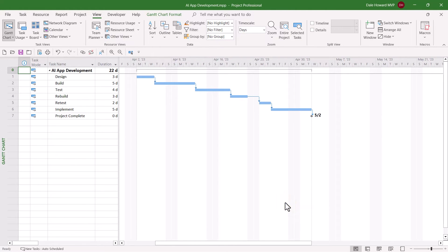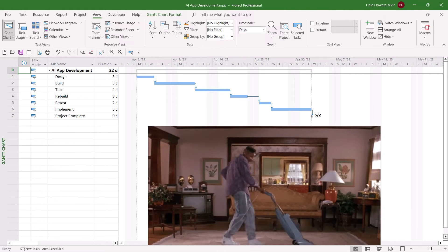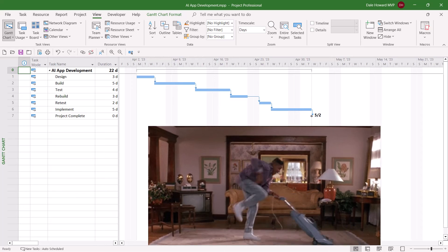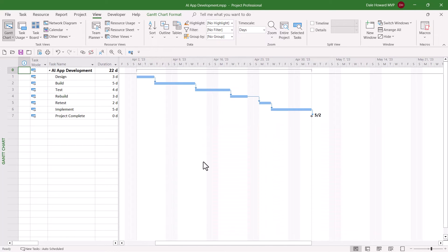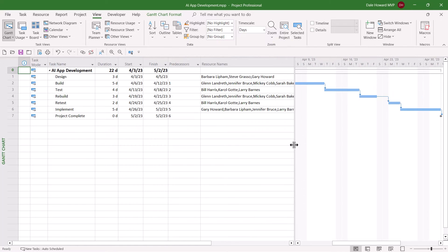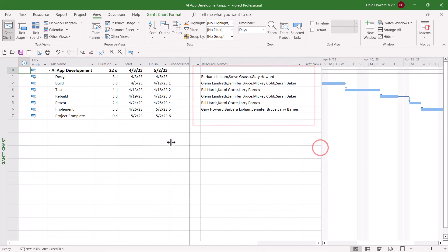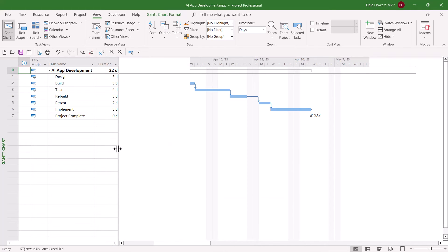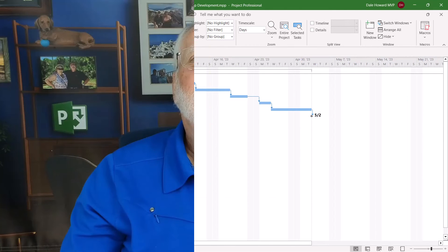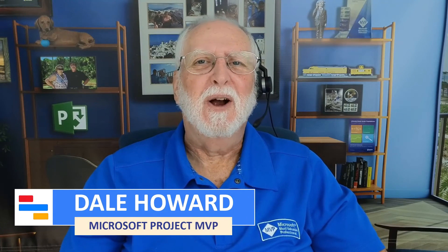There, I have a totally clean Gantt chart screen. No team members' names displayed to the right of the Gantt bars. Does that mean nobody's assigned to the tasks in the project? Oh, no. Look, the Resource Names column reveals I've got resources assigned to each task. I just don't want to see all those names to the right of their Gantt bars. All right, those pesky Resource Names are gone in the Gantt chart view.